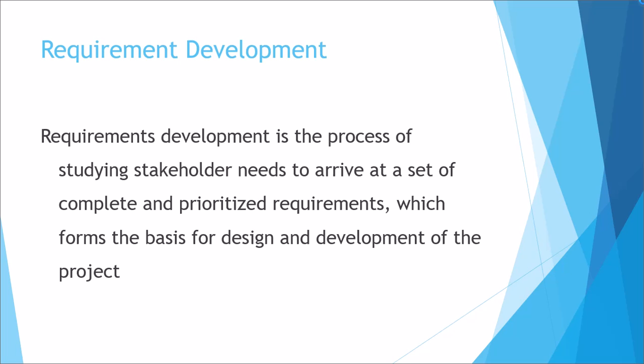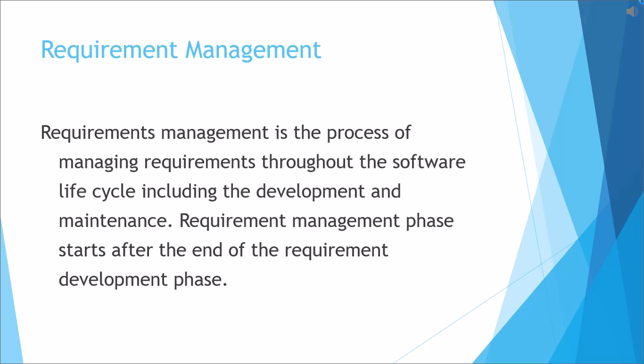Requirement development is the initial phase of any project, and it involves understanding the requirements, analyzing the requirements, validating the requirements, and getting a formal approval from the customer. That means requirement development ends with the signing of the requirements document in case of traditional SDLC methods. In case of Agile and other methodologies which are more iterative, requirement development will keep on getting repeated on a regular basis or with each iteration.